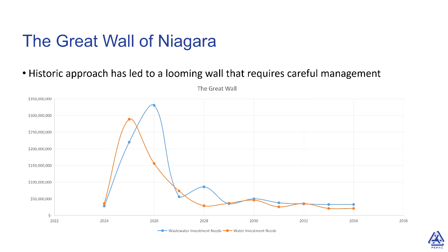What we do at a municipality is that we can plan long term, but we only get approved spending for the next year. So if we have multi-year projects, we can't lock in funding for 5 years or 10 years. And what this does is it creates some unrealistic expectations.